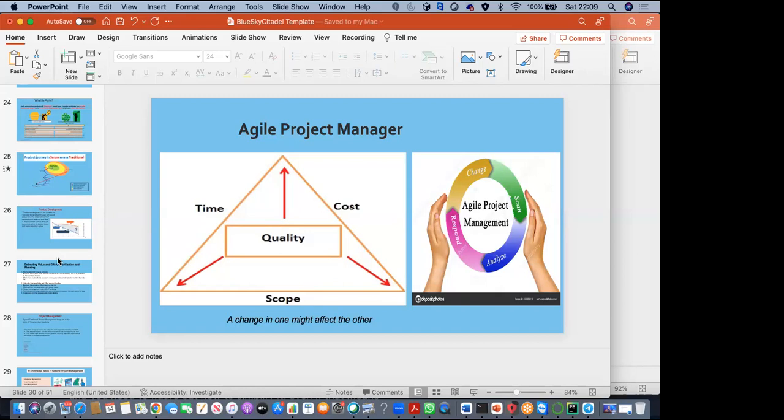If what they have said to you is, we're giving you £10,000 to deliver XYZ, and you look at it, and that £10,000 is not going to do XYZ, and they said to you, we need it in 3 months, and you realistically look at it with the team, and you know that 10,000 can only deliver X, it wouldn't deliver Y, and it wouldn't deliver Z, then you have to communicate that expressly to them.